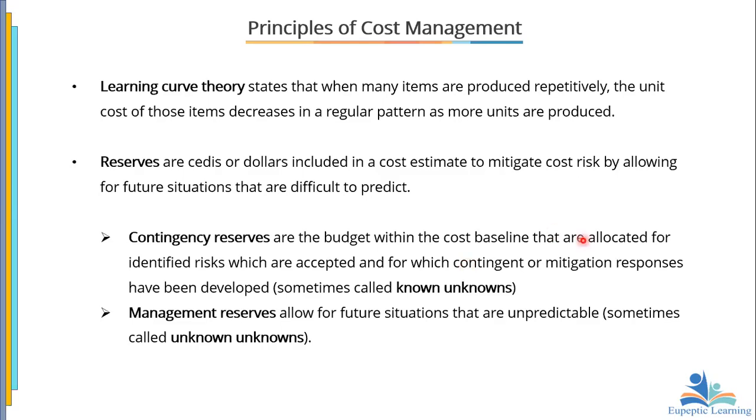So that is it. The management reserves are not part of the cost baseline. No. We usually put the management reserve on top. After we've done everything, including the contingency reserve, then we put the management reserve on top. So usually it's on top of the cost baseline.